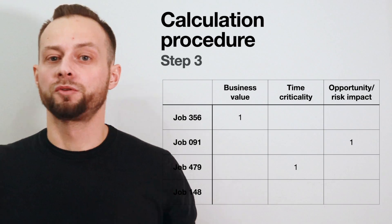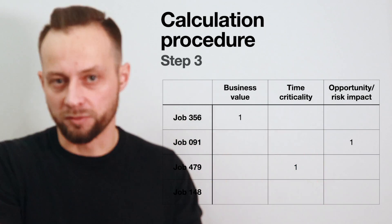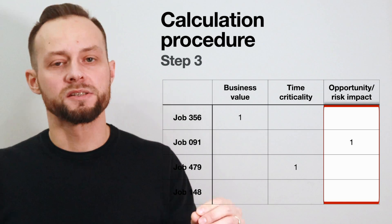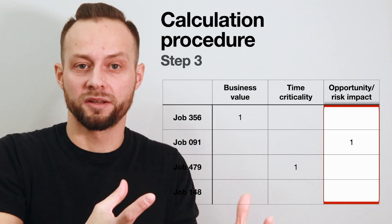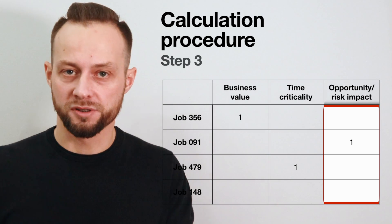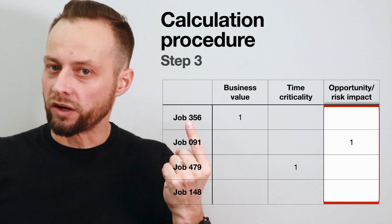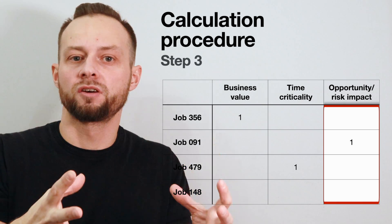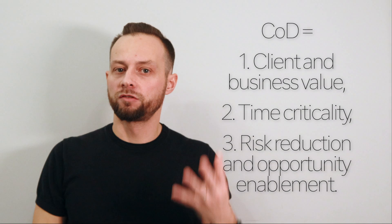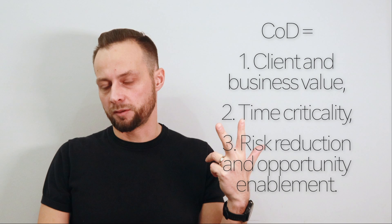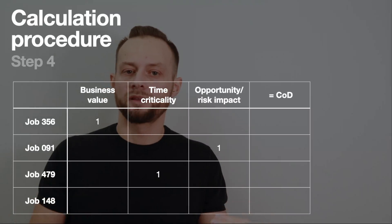Step three: go to the next column — risk reduction and opportunity enablement. Choose the job that has the least impact on risks and opportunities and set it to one. This is another smallest value within this particular column; it can be any line you choose. Then estimate other jobs relative to this one — to what extent do they have a stronger impact on risks of the entire initiative? Step four: recall that CoD is a sum of client and business value, time criticality, and effect on risk reduction and opportunity enablement — sum up the first three columns.